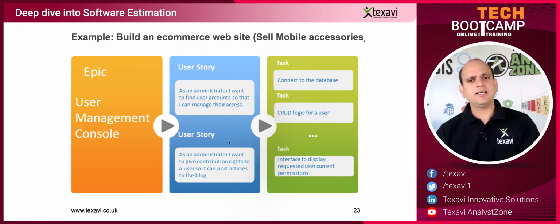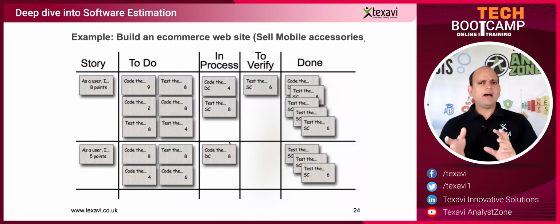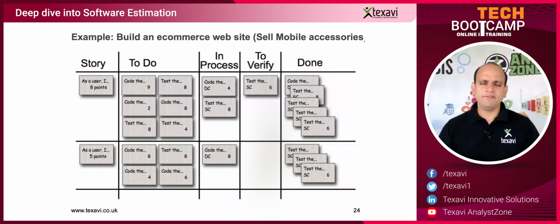And then once that is done, you can have a rough idea of how many stories you have. From there on, we use what we call planning poker. We're going to get into details later. We would then invite the development team and ask them, hey, take these bunch of stories and come up with the user story points for these.